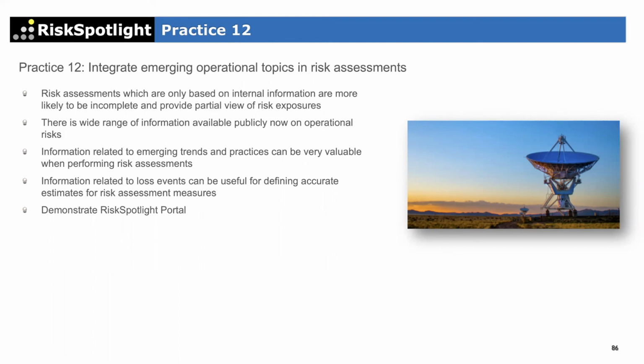In that case, your risk assessments would most likely be incomplete or partial, because you've not factored in that maybe the likelihood of something happening is higher because of some information which is available, or some trend which is being reported. The people doing that assessment internally aren't aware of that trend, and then they think, oh, it's not happening here, so it won't happen here in the next 12 months. That's where the quality of the risk assessments will be weaker.